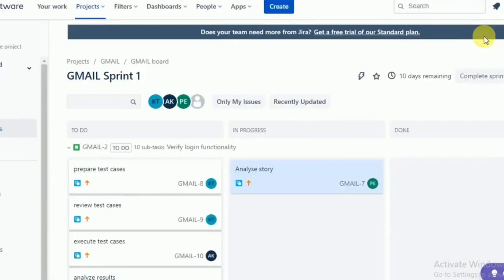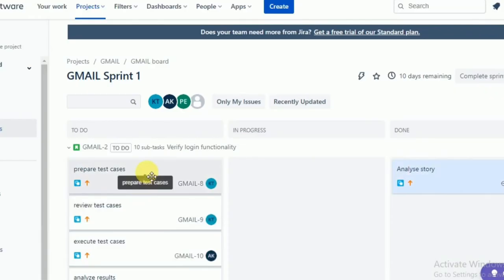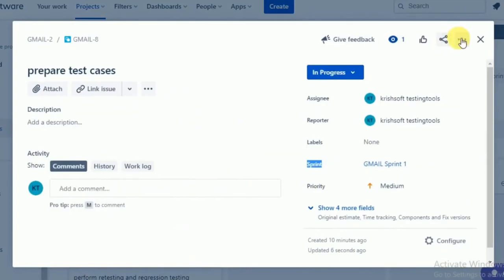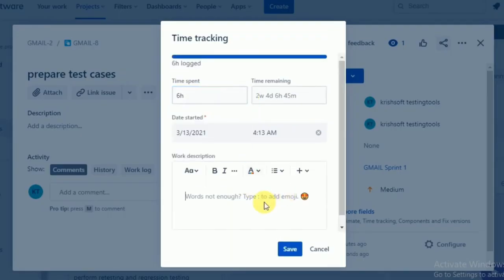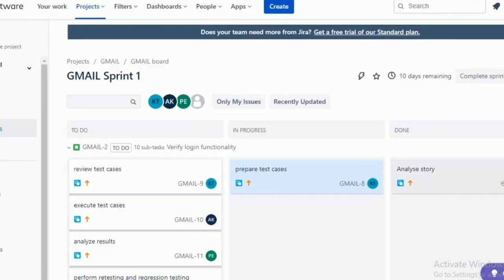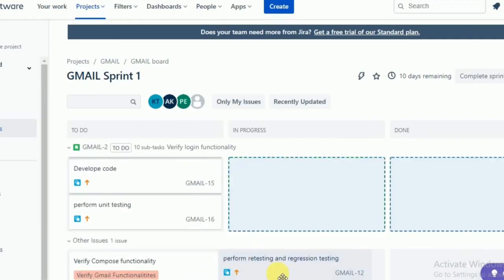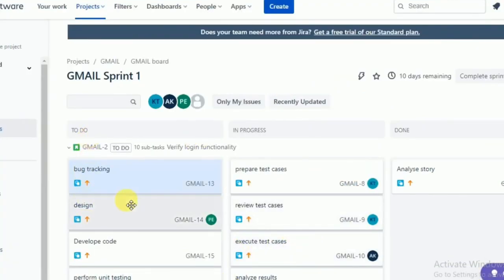Similarly, once 'Analyze Story' is completed, move it to done, then start 'Prepare Test Cases.' For preparing test cases, you log 6 hours for one day. Like this, you log your work. 'Analyze Story' is complete — shown as struck off. Then 'Prepare Test Cases,' 'Review Test Cases,' 'Execute Test Cases,' 'Analyze Results,' 'Perform retesting and regression testing,' and 'Bug Tracking' — all tasks are there, moving through in-progress to done.